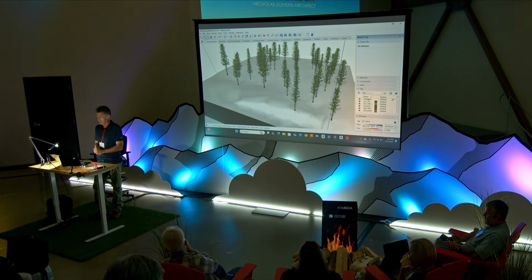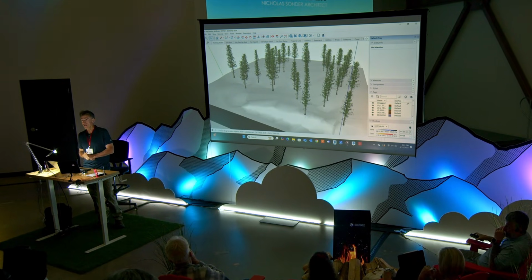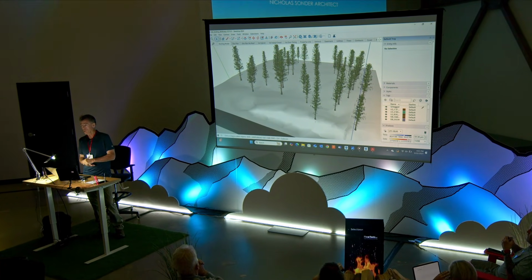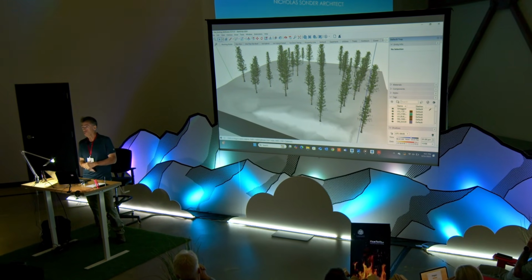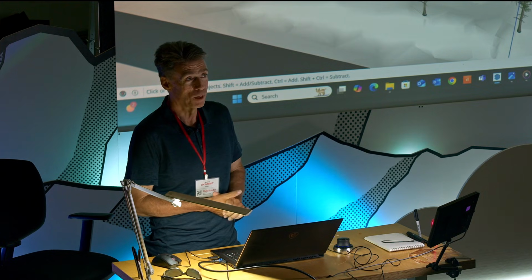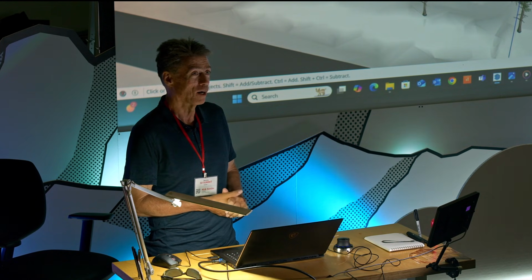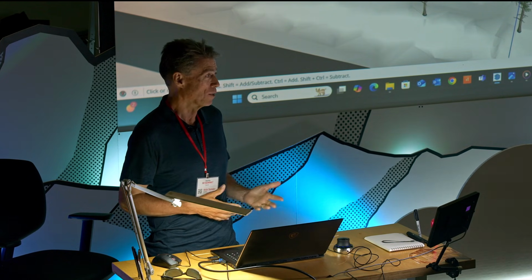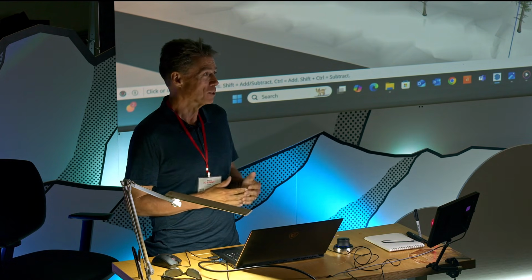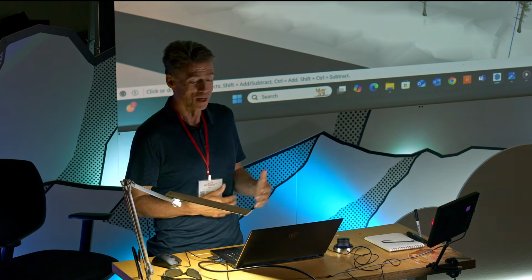This is going to be a pretty loose presentation of a home that I designed about a year and a half ago, and it's been under construction now for 2 years. It's supposed to wrap up in about 3 or 4 months. Our construction timeline in the Tahoe area is pretty extended because our weather changes drastically in the fall. We're also restricted on when we can do earthwork and things like that, so it really extends that timeline.